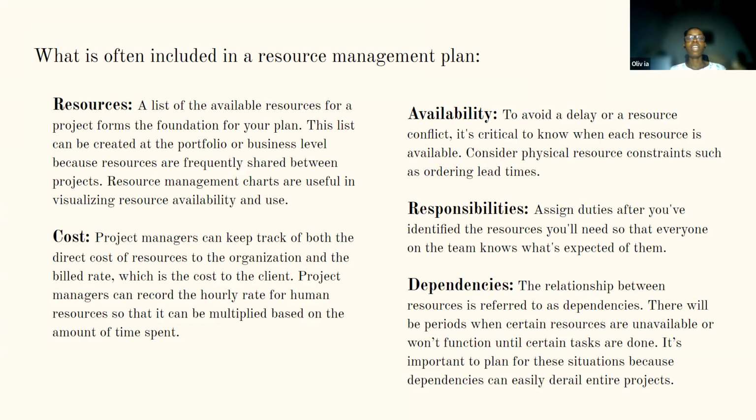We need a configuration of a module called booking system for Odoo. After that takes place, you need to be able to do an inventory configuration. The inventory configuration cannot happen without the booking system working properly. So that's just an example of what a dependency is.